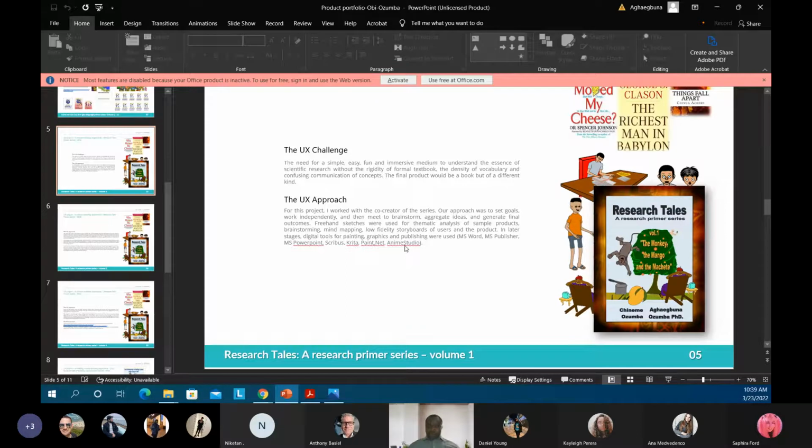You can put all the stakeholders in a room, and they would include the people you're working with, the users at the end of the day, the owners, the charter owners, the funders, everybody. But if you're also able to break down your project into stages and know who your stakeholders are, stage by stage, you will know whom you are serving the most at each point.